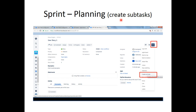Click on these three dots and create a Subtask as shown. The moment you click the three dots, a pop-down appears and you can click Create Subtask. The concept is: Stories are broken down into tasks, and tasks are technical in nature — such as Development, Testing, Impact Analysis. Basically, the actual work needed to achieve the Story. Story is the What; Tasks are the How.